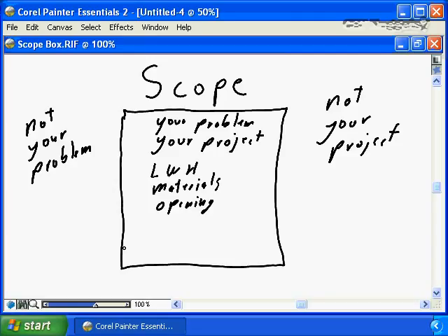But in most instances, there's going to be cross boundaries. There's going to be inflows to your project. There's going to be outflows to your project. By defining and managing these inflows and outflows, you are again helping to define your scope. So you're defining that it has to accept this input number 1. And you're going to define specifically what that input number 1 looks like.